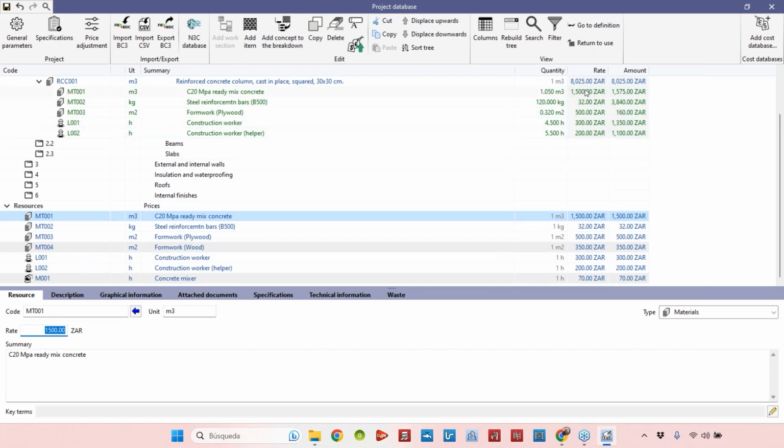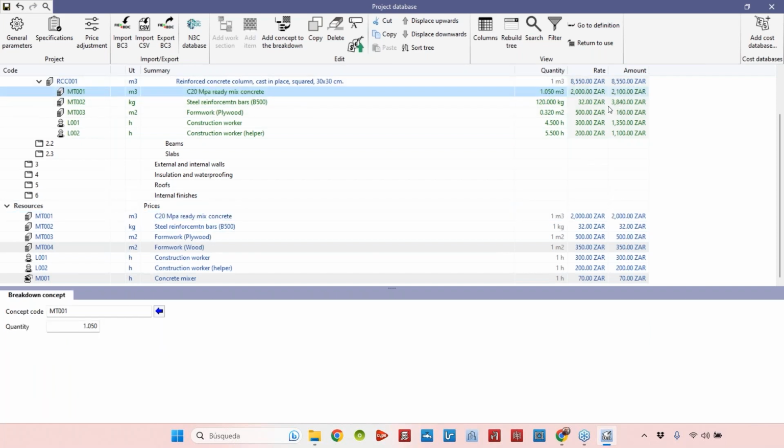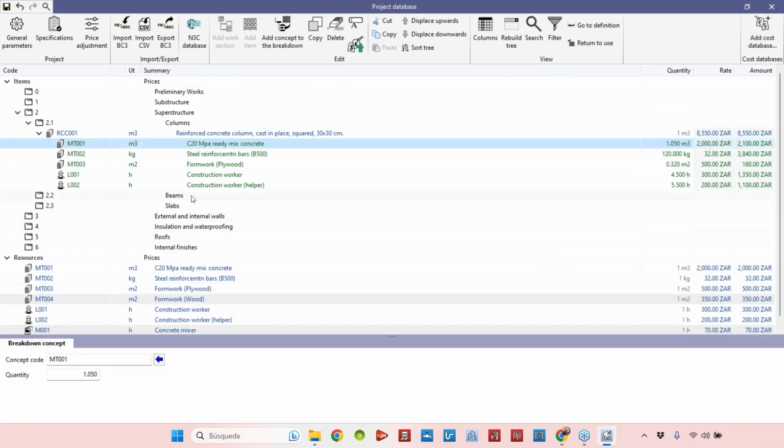Okay, as I said before, if I change the price here, let's change, for example, the price of the ready mix concrete. Let's add here 2000 rands. So 2000 rands here, change it also to 2000, and the final price is also changed. Okay, so the best way to update this information in the future is going to be by updating the prices or the concepts here in the resources options. Okay, so as you can see, it's very easy to create resources, items, folders to create your cost database here